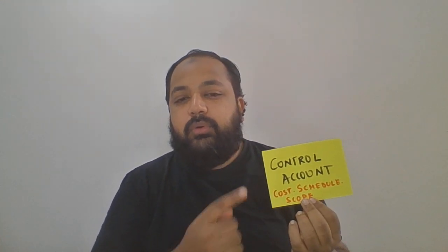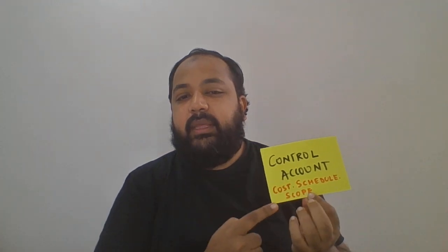Control accounts, as I told you, talk about cost, schedule and the scope of the project. It comes after the deliverable and above the work package. Every control account, remember this, will have multiple work packages. But one work package cannot be in two control accounts. One control account can have multiple work packages, but one work package cannot be in two control accounts.